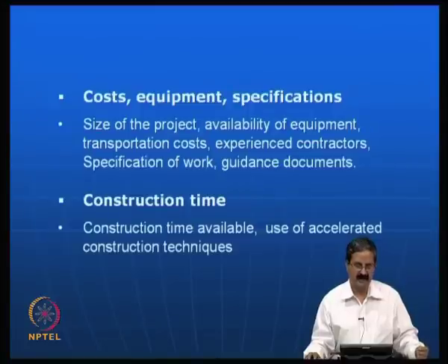You should give them the sequence of work right from the beginning, cleaning of the ground to complete erection, the complete work. Initially you have to clean the ground, then bring the equipment, then make some holes at a specified spacing. There are so many issues there, it is not easy.